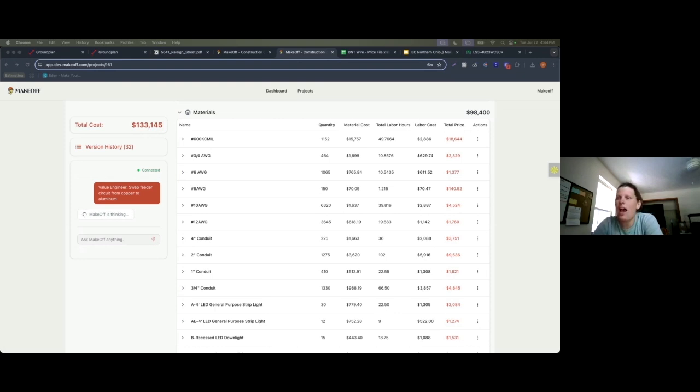I have found there's some more in mechanical than in plumbing, but one of the things that I always keep an eye out for is random electric, because they kind of take the electrical print and throw it everywhere in the print. You'll see there are throwaway notes in mechanical that say you're responsible for the disconnects or something like that, which in a commercial project can be thousands of dollars.